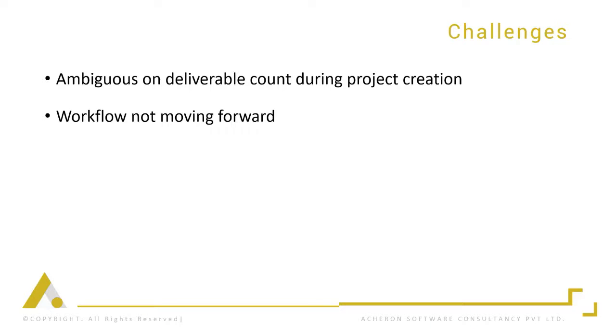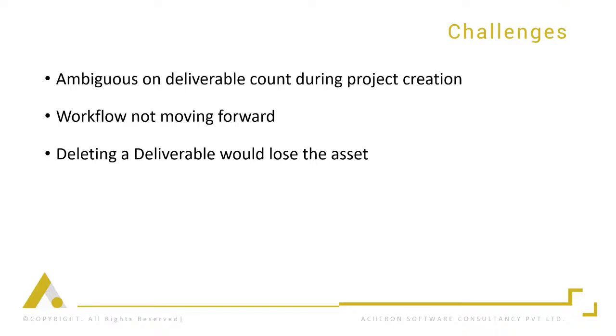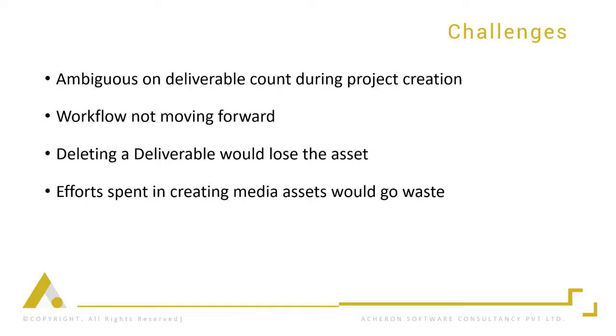The workflow would require completeness of all deliverables to proceed to the next task. Hence, if certain deliverables are not uploaded or reviewed, the workflow would halt, hampering project completion. There are also chances that later in the workflow, the project manager may have to delete certain media in order to allow the workflow to progress to next stages. Deleting a deliverable that was earlier uploaded would remove the media from the repository, thus rendering the efforts to go waste.